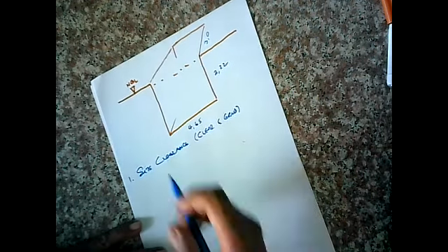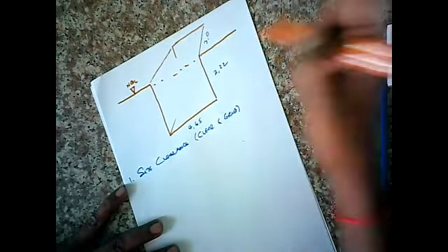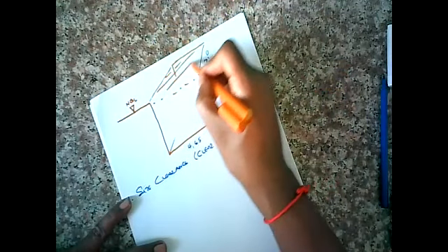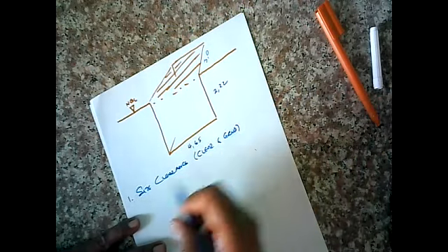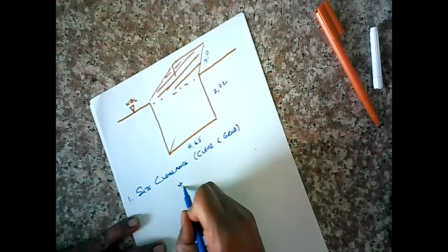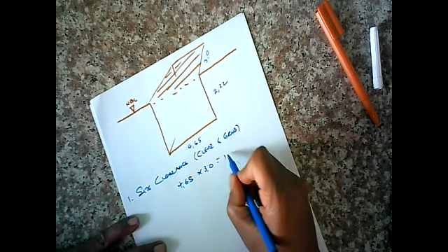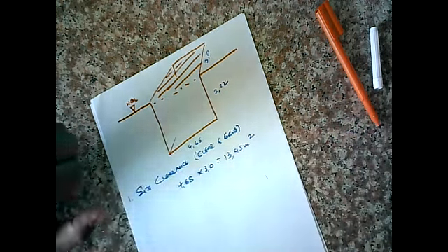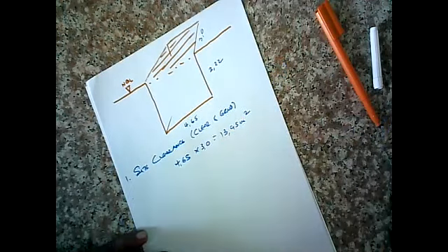All right. And what we're doing here, we're clearing this area to start work. And what is the area? The area is simply this portion here. All right. Because we didn't start digging. And those dimensions are given by what? 4.65 times 3.0, giving us a total of 13.95 square meters area. So we cleared the site now. That's how much area we got to deal with.